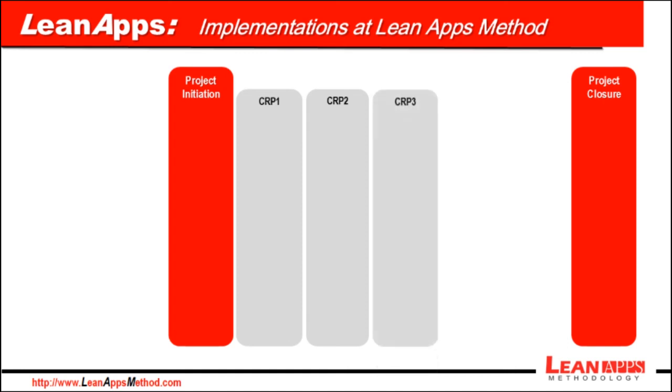Third phase is CRP3, whose purpose is to test and validate the entire solution, including all customizations, extensions, interface, data conversion scripts, reports, and workflows that were developed. Fourth phase is transition, where users are trained and then they validate the system. Cutover plan is executed to deploy the solution to production. This phase ends with the go-live.